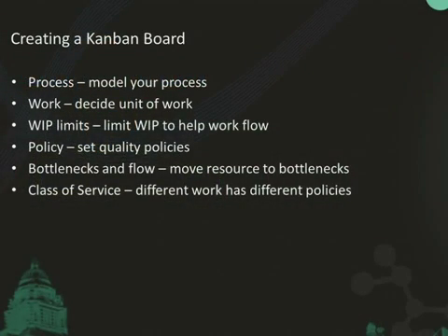Set WIP limits, work in progress limits, on each of those activities so that you're not multitasking and spending 6 months doing requirements analysis because the requirements engineer started on 50 requirements and never actually got any finished. You set policies. What does done mean? Typical in Scrum, you've got that. But you have that at each of those activities. So when we say that the requirement's done, what does that mean? When you say that testing's done, what does that mean? You define them. Makes it more predictable, and it makes it higher quality.